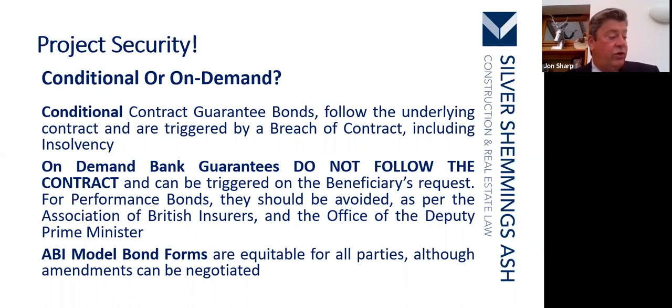So, should you have your surety bonds, conditional or on demand? Well, conditional contract guarantee bonds follow the underlying contract and are triggered by a breach of the contract, including insolvency. On-demand bank guarantees do not follow the contract and can be triggered on the beneficiary's request.